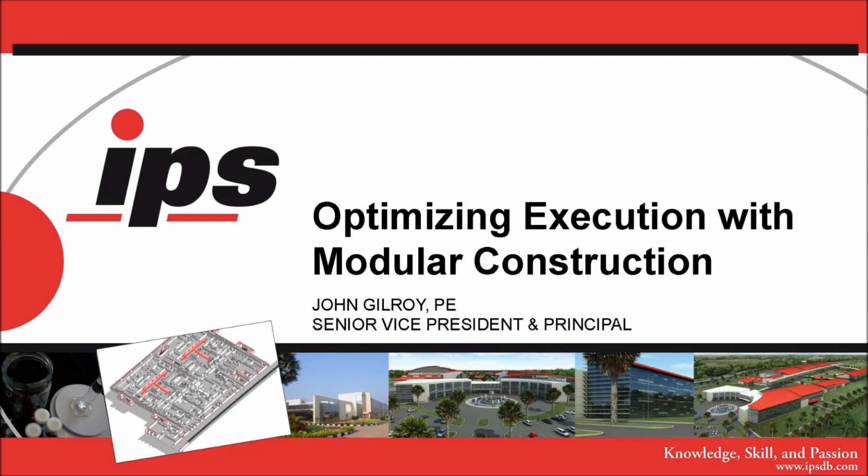Some disadvantages to modular construction. Modular delivery methods lock down floor plan or system requirements at an early stage, if schedule gets to be a determining factor for fabrication. Could be some increased engineering costs due to the 3D modeling required. We believe that's offset by the savings downstream in construction, and timing with construction management personnel or general contractors on site will be reduced.